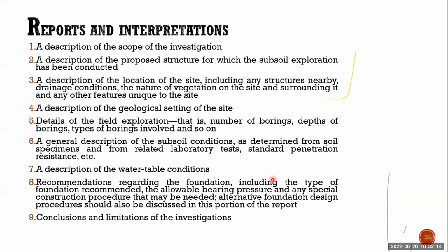In the report, we are going to give the recommendations for the foundation, including the type of foundation, whether it is shallow or deep, or any slope issues, or any underground excavations. And also we include the conclusions.